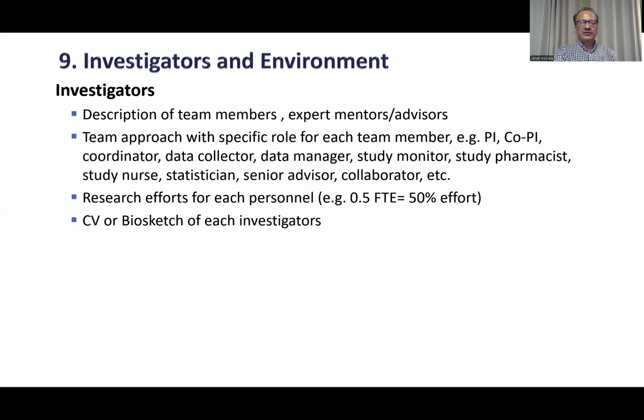So there should be a description of team members, experts, advisors, etc. Similarly, team approach: PI, principal investigator, co-principal investigator, coordinator, data collector, data manager, maybe statistician, or senior advisor, or collaborator from other institution or other department. Research effort for each personnel should be mentioned, as I said earlier, 0.5 FTE means 50% effort of your time, or maybe it could be 0.2, which is 20%, etc.